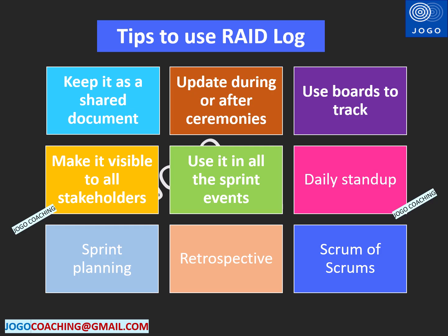When to use the RAID log? During daily stand-ups, we can capture the issues and blockers and add them to the RAID log. Okay, during the daily Scrum meeting, we can capture it. During the sprint planning meeting, we can capture the assumptions and dependencies to plan the backlog items' due dates. During the retrospective meeting, you capture or revisit the risks and issues to see if they are closed or mitigated successfully as part of the sprint.